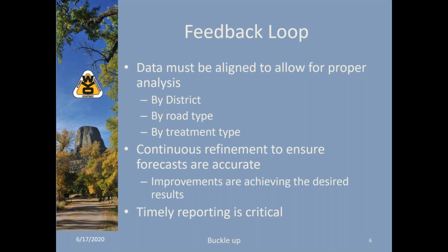That analysis was able to be shown to our executive staff. This year, for example, they required one of the districts to push out a lot of their improvement projects, pull them back, and made them hit their performance targets. That's the power of being able to integrate this together.